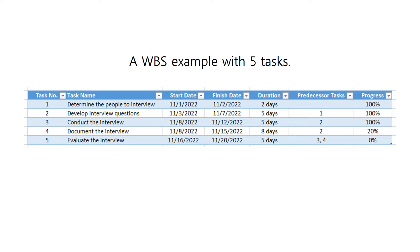For example, here is a work breakdown structure of conducting an interview with five tasks. The WBS must include the task number, task name, start date, finish date, the duration, and the predecessor tasks that indicate which tasks must be done before starting another task. For example, task number two can only start after task number one is complete. Tasks three and four can start at the same time after task number two is complete. The task progress indicates the percentage of work done to show the actual progress of each task. We will be using this work breakdown structure in creating our Gantt chart.